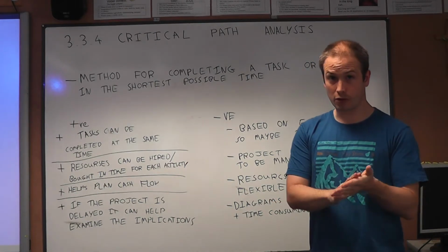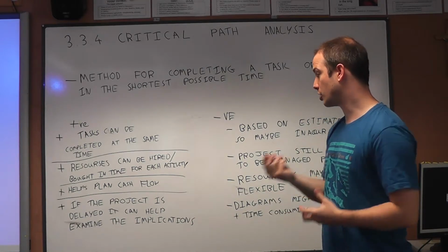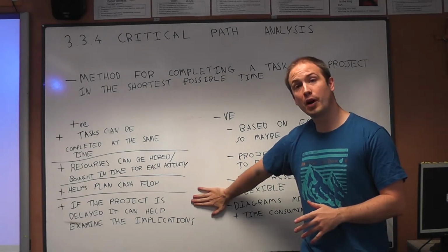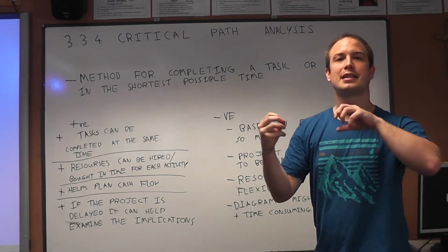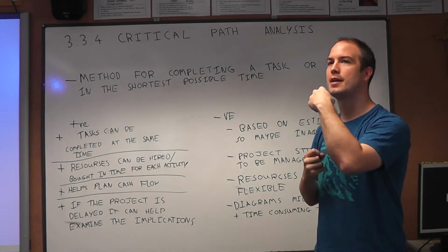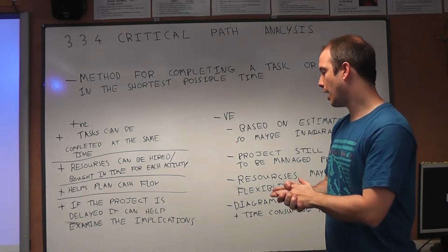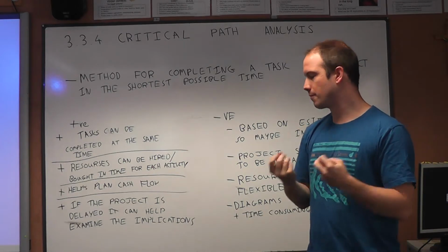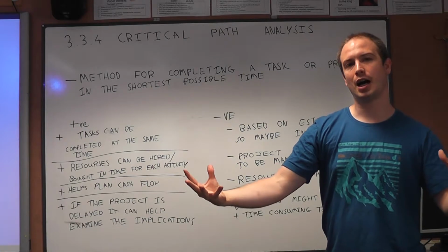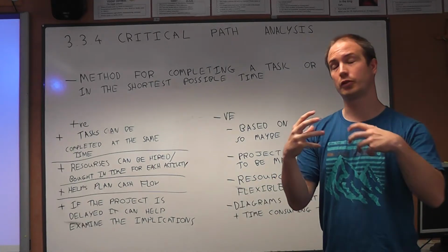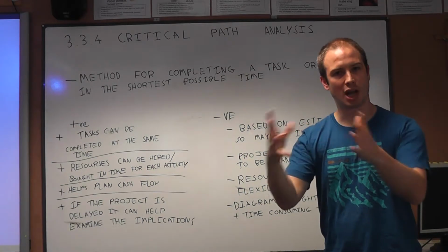And yeah, if it all goes wrong, which many building projects do, obviously the weather and things like that might change things, the critical path analysis is a really good place to start. You can look at an activity, see if that changes length. Does that mean that that's now the longest length? Is that now the critical path? So you can make sure that the project is not affected in an extensive way, or you can look for a way that the damage of changes can be limited.